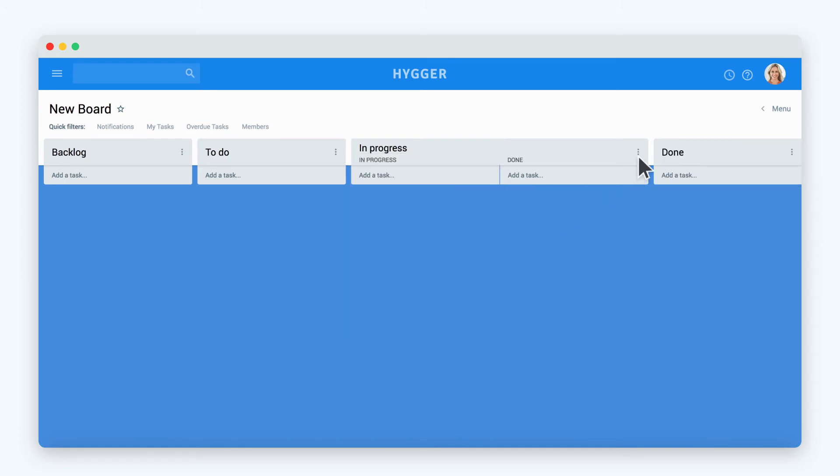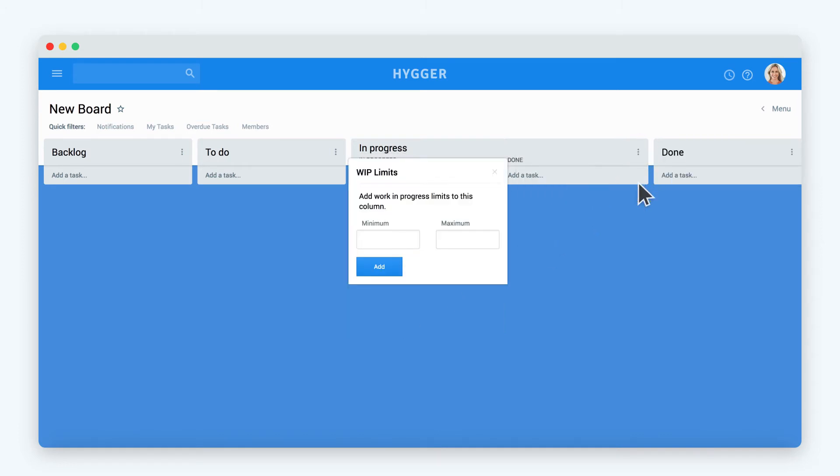Let's set work in progress limits for the column. Hygur allows you to track the number of tasks in the in progress column with the help of WIP limits.